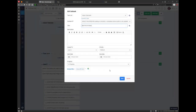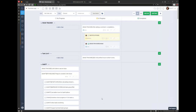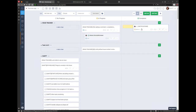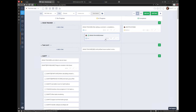If you want to change a subtask status, you can click and change it, or edit and save. So a task can be in progress with two subtasks where one of them is not started. Either people don't use subtasks if they use Kanban, or they understand that moving a subtask to a different column breaks the relationship — it's no longer a subtask, it's a separate independent task. That's all I can fit into one hour.